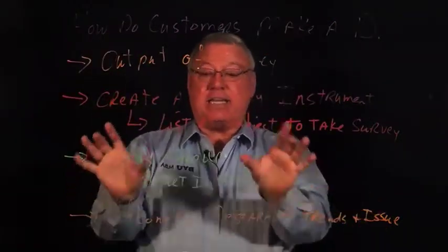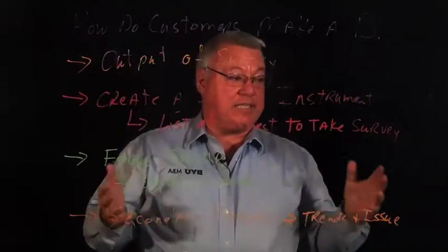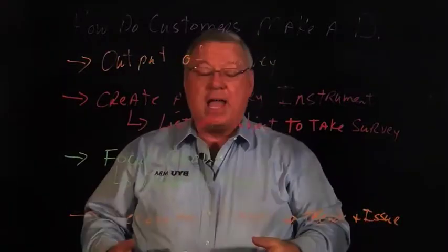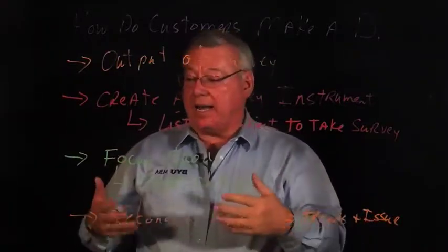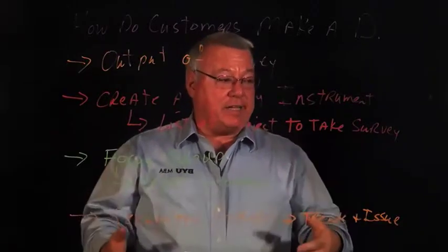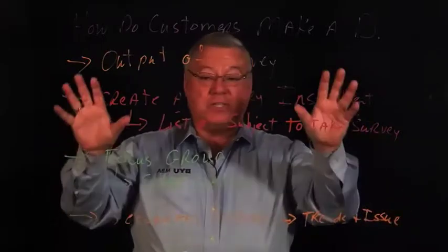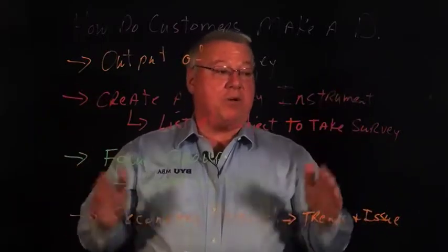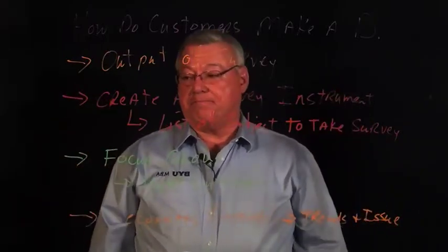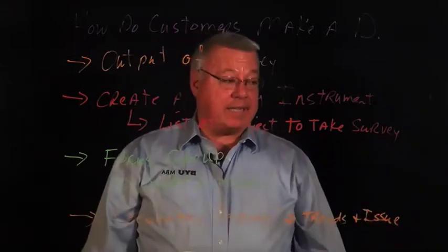Now we can take each one of these individual elements, these tasks, these activities, and we can place them in an action register, assign them to individuals within the team, and develop a Gantt chart with a visual representation of how we will get our project done on time. And that's it. That's how you make a work plan.